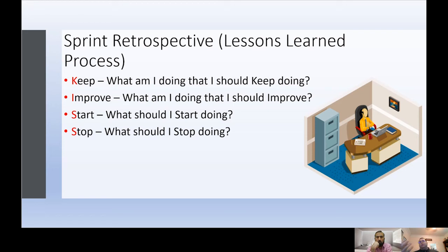I take everyone's responses, I put it in a PowerPoint presentation along these 4 questions. Sometimes you have to sanitize the answers to make sure nobody's names are in it or it doesn't identify any particular person. Put it in a PowerPoint presentation and send it out to everyone so that everyone's voice is now heard on the project.